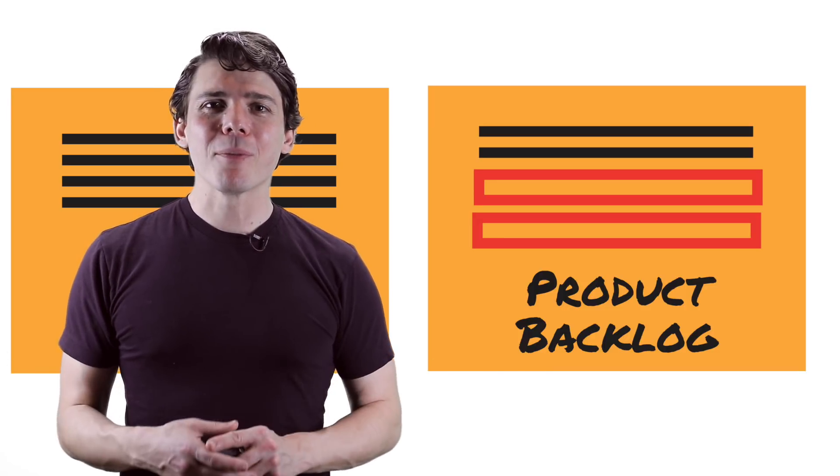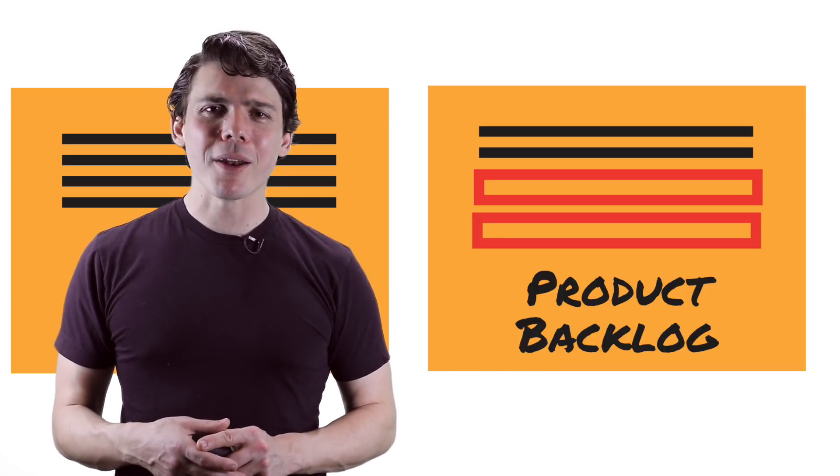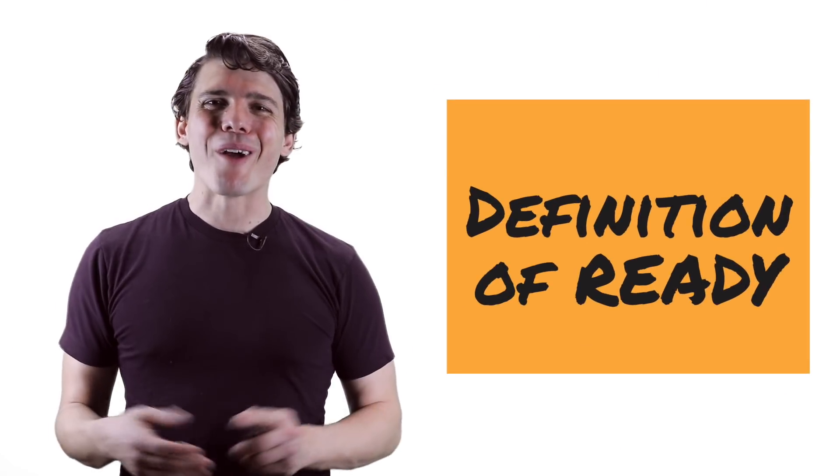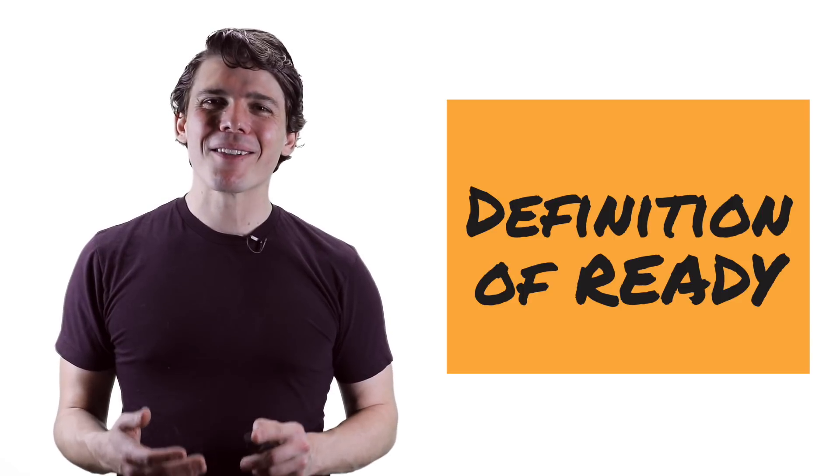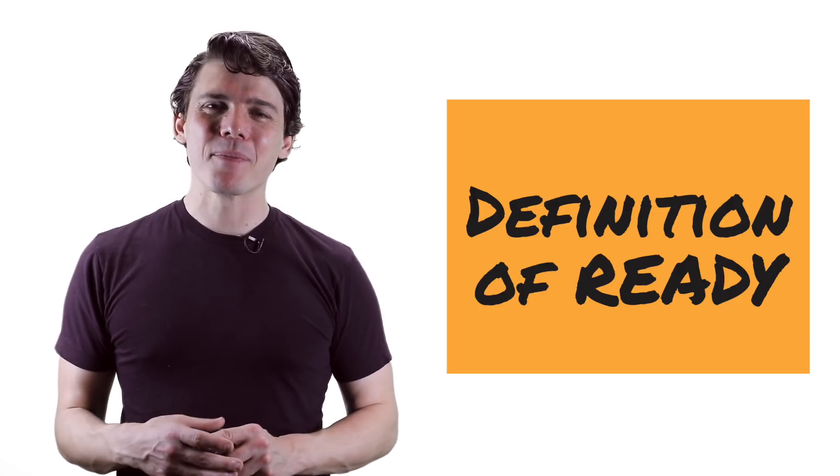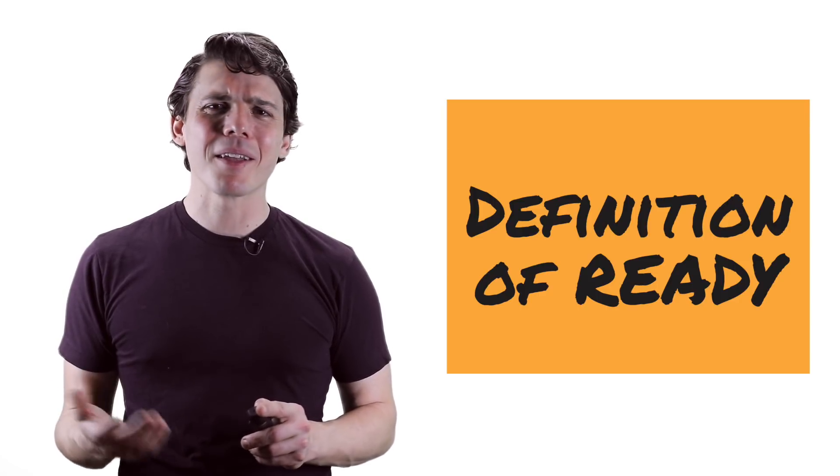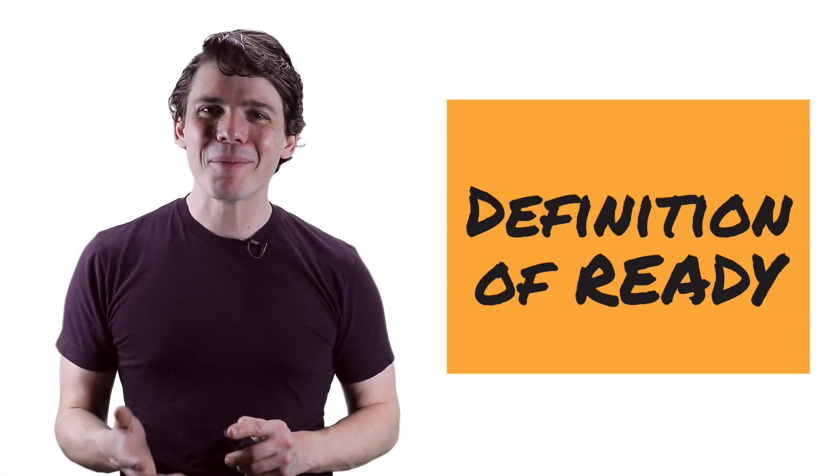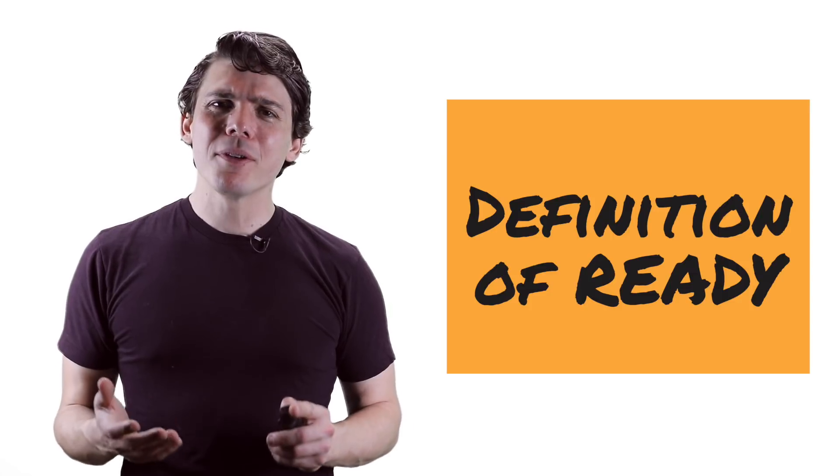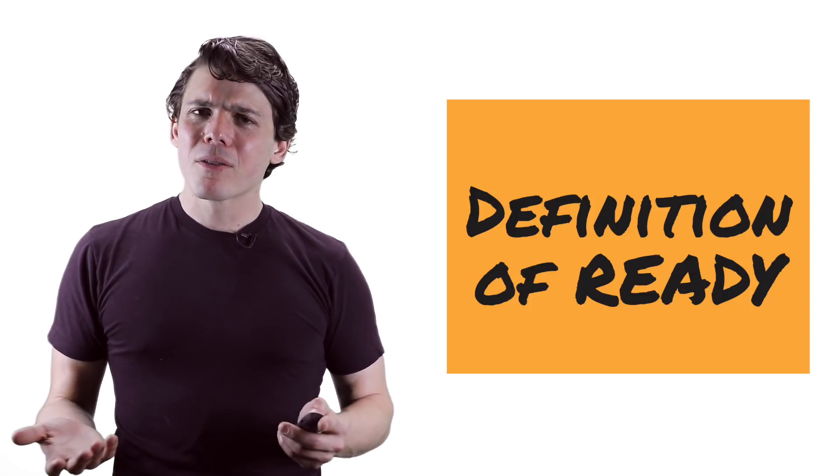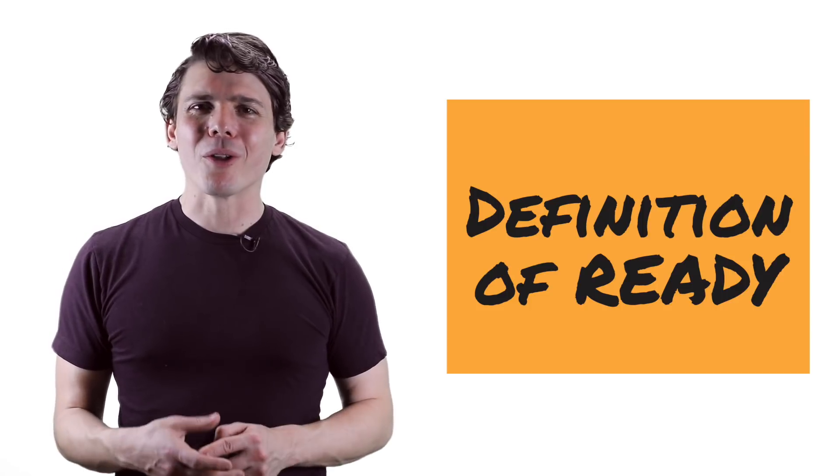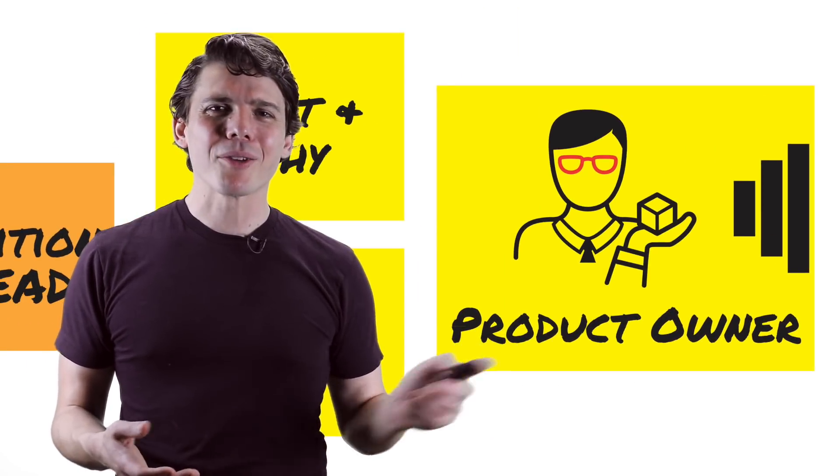Notice how some of the work on your product backlog will be ready to work on while some isn't. How do we prevent items from making it onto the sprint backlog before they're ready? We use a definition of ready, a documented team agreement that specifies the conditions that must be met, such as being the right size and having clearly articulated acceptance criteria that the team understands, before the team pulls the item into the sprint backlog.